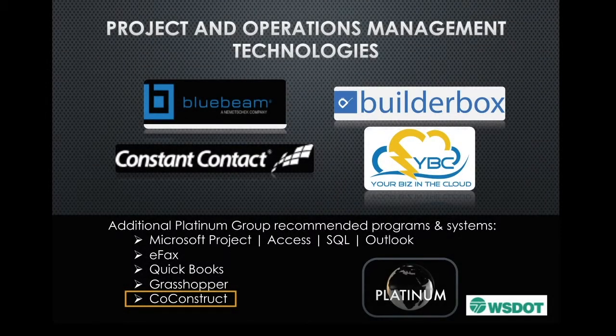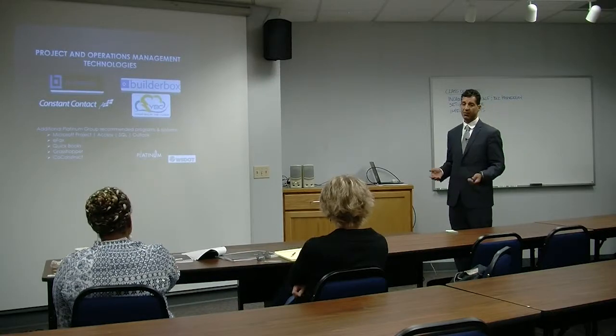Co-construct, and a lot of your large public works projects, they require information on time codes. And so those time codes are going to be responsible for documenting all your labor hours. So if you have 4 people working for you or 40 people working for you, you have to be able to give that consideration to the overall project and documentation. This program allows you to do that. It also has cost codes, so you can incorporate cost coding into your program. And so great tools that really empower the small business.